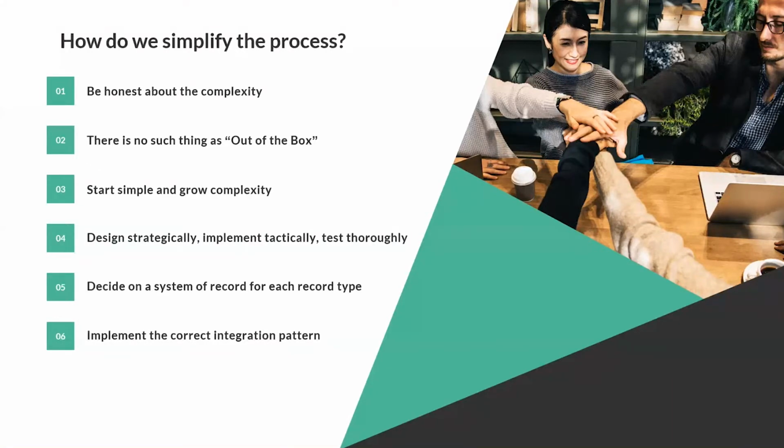That way we're not necessarily using the same resources and the same business owners that are working on the implementation in order to do a migration or an integration. We'll run them with a separate project manager, a separate project team, and really make sure that it's getting the time and attention that it deserves.